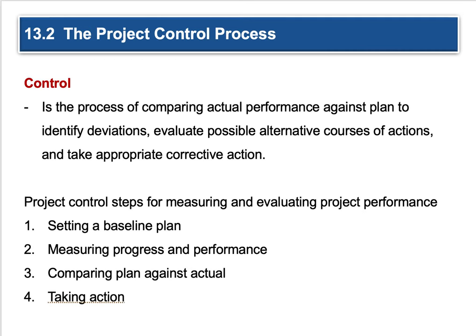The project control process is the process of comparing actual performance against the plan, identifying deviations, evaluating possible alternative courses of action, and taking appropriate corrective action. It comes down to responsibility — are you being responsible with your own timeline? You make a plan, you stick to it, and you adjust it if a problem arises, making sure you're zeroing in on your project objective in a timely and cost-efficient manner. Project control steps are: setting a baseline plan, measuring progress and performance, comparing plan against actual, and then taking action.